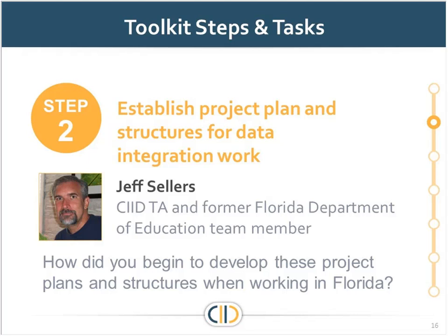And then a third aspect when it comes to this project plan work, we felt as we were going into this project that we had the education program expertise and background collectively within the agency, but since we were developing a separate data warehouse to house the integrated data, we did not have the data warehousing expertise. So we actually engaged a vendor with that expertise to come in and help us with the development of the data warehouse.